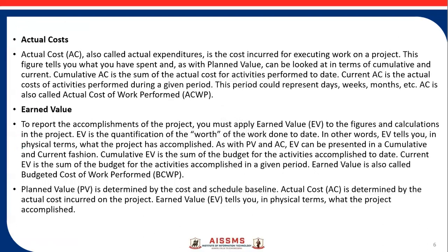Now, actual cost — also known as actual expenditures — is the cost incurred for executing work on a project. This cost will tell you what you have spent. As with planned value, it can be looked at in terms of cumulative and current. Cumulative actual cost is the sum of actual costs for activities performed to date. Current actual cost is the actual cost of activities performed during a given period — days, weeks, months, etc. AC is also called the actual cost of work performed.